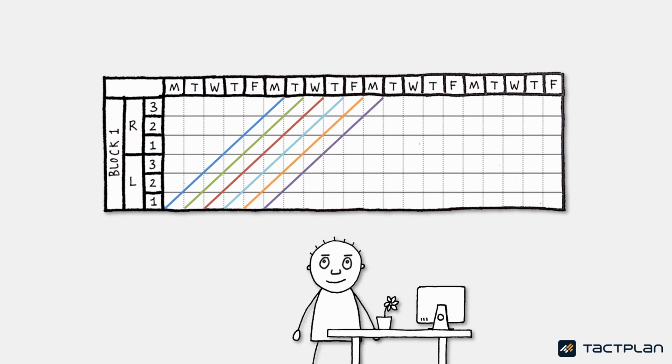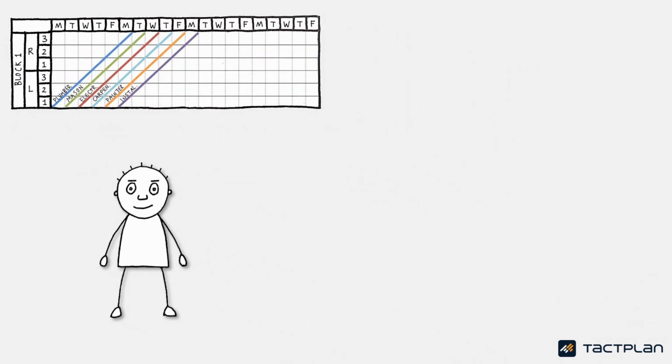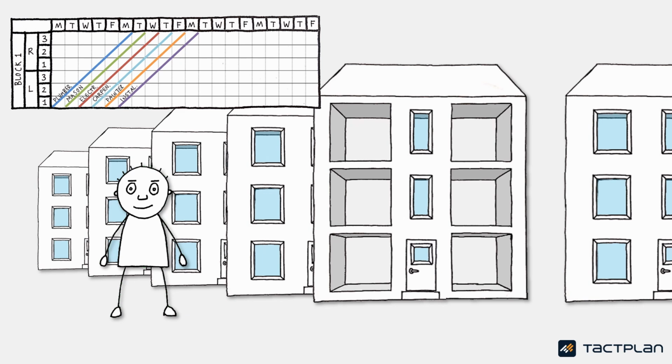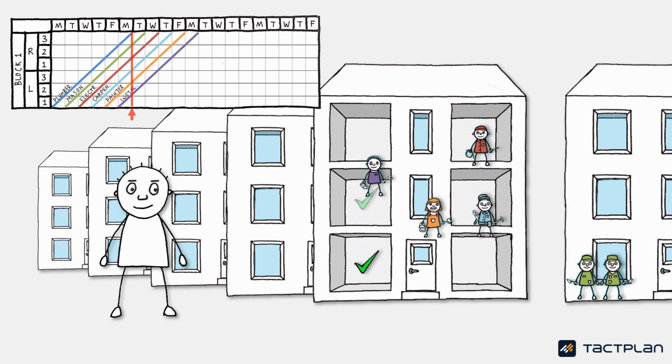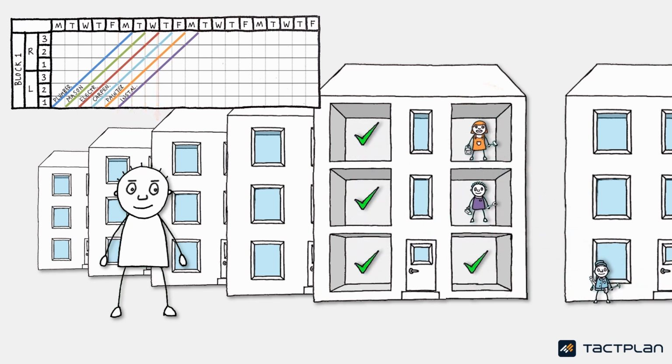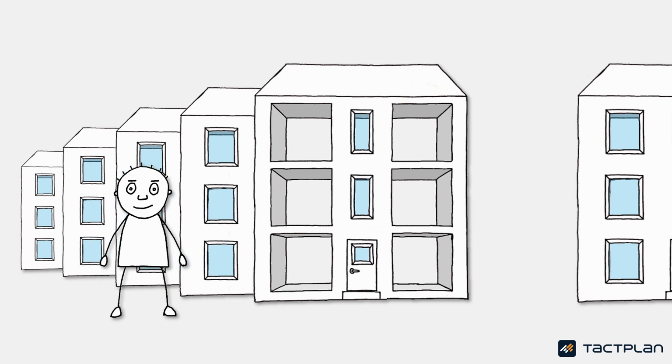Additionally, John can fit his entire plan onto a single page, giving both him and his subcontractors a clearer overview of the entire project. The primary goal of this scheduling method is to ensure that different teams do not work in the same locations simultaneously. It also helps fill empty work zones more effectively, ensuring a seamless construction process and optimal site utilization.